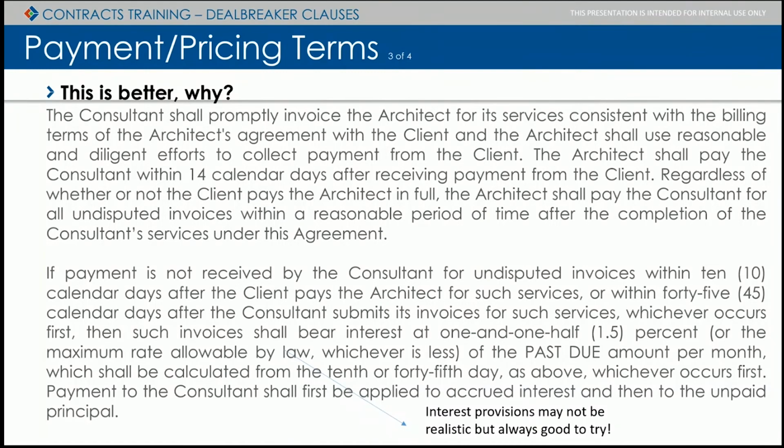All right. This is a better example. I'm going to summarize why it is. It's because we've really gotten rid of the pay when paid or paid if paid. So regardless of whether the client pays the architect in full, these terms, we're going to get paid anyway. In the real world, this almost never happens, and I recognize that. But to the extent we can get folks to agree to separate our payment from getting paid by the owner, that's a big, huge win for us.